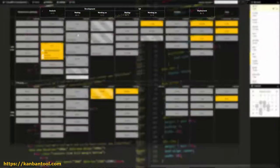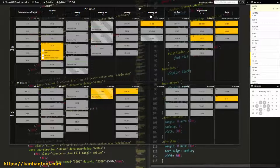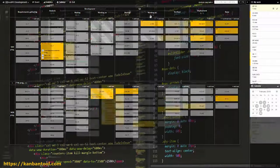The WIP limit is applied to these columns and is set to one task per person. With this, the team stands a good chance of ensuring high-quality performance with as few corrections needed as possible.